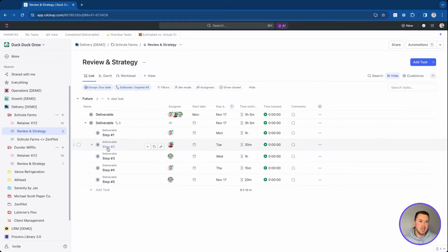What I would recommend is that each of these become one user in one sitting, not to exceed 4 hours. 4 hours is just kind of a great way to navigate that. Again, if I do an 8 to 12 hour time estimate, then when am I actually working on that? We like to have tasks that are a little bit more bite-sized pieces, not too granular that you're overwhelmed with the amount of tasks, but a little bit more bite-sized to know, hey, I'm going to do this. I can do it in one sitting, just get it done. I'm going to finish it that day, and I'm also going to start it that day. So that's going to help you a lot with understanding workload and capacity for your team.